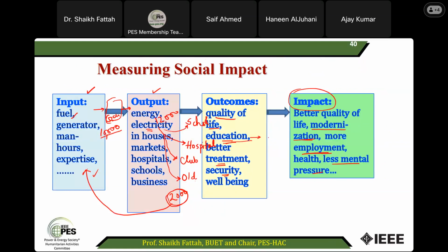You see, there used to be 100 students, but 20 students, 20%, used to fail. Why? Because they don't study at night, they don't have this opportunity. But if I introduce this system, this 20% failure rate will be reduced to 10%. So 10% more people are now passing. If they fail, then they have to study again for 1 year, and that has a cost. If they pass, they don't have to spend that cost. Also, they will go to the job market 1 year faster, which means they can earn more.